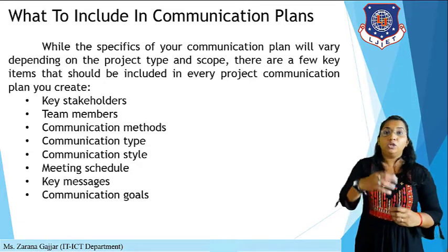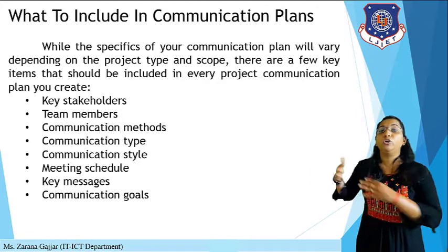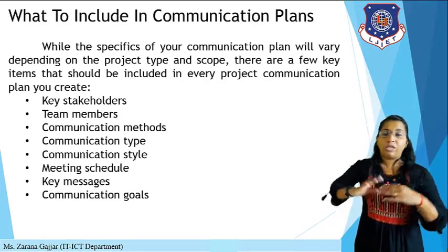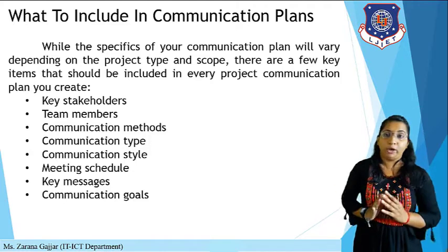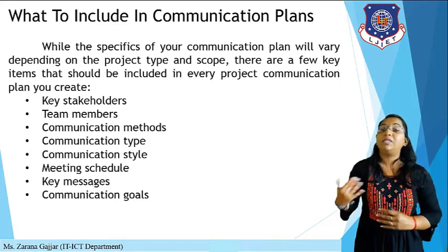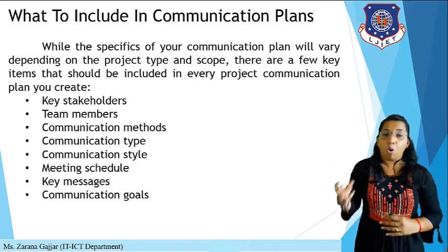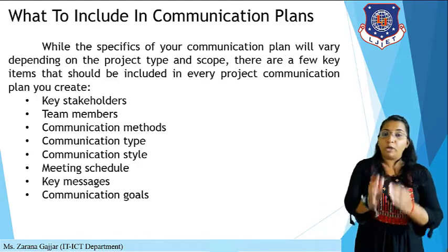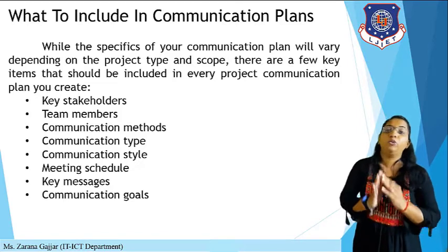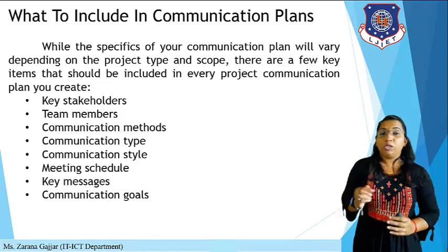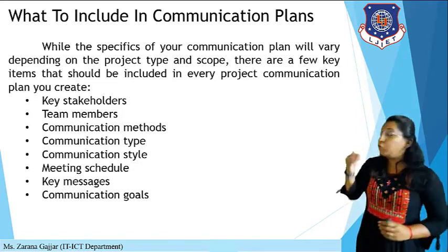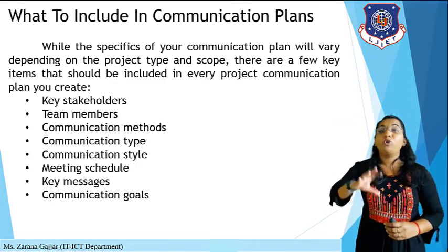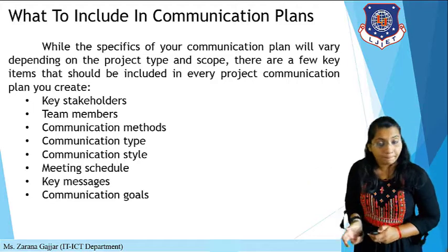Then the meeting schedule. For better communication, you can schedule meetings like a review meeting or a requirement gathering meeting, in which you are going to discuss all the points. Then key messages, so what the key messages are that all the team members should follow, and also the communication goal. Whatever the goal of the communication is, you need to define it. So in that communication plan, you need to include all these things. Right, so this is all about what to include in a communication plan.